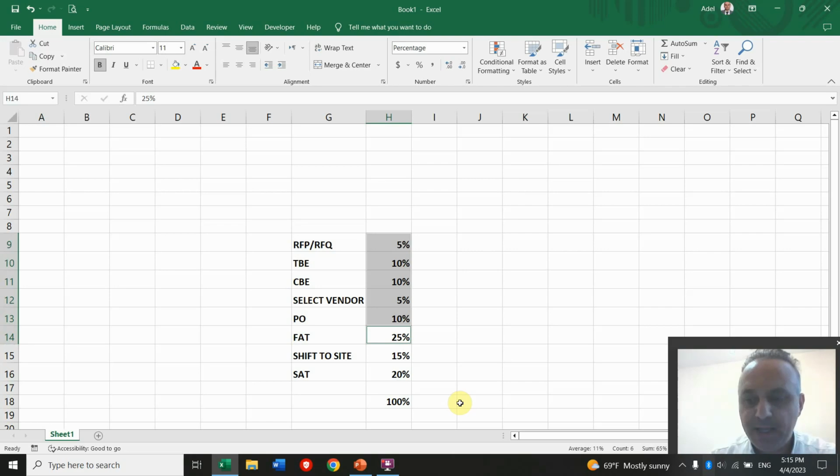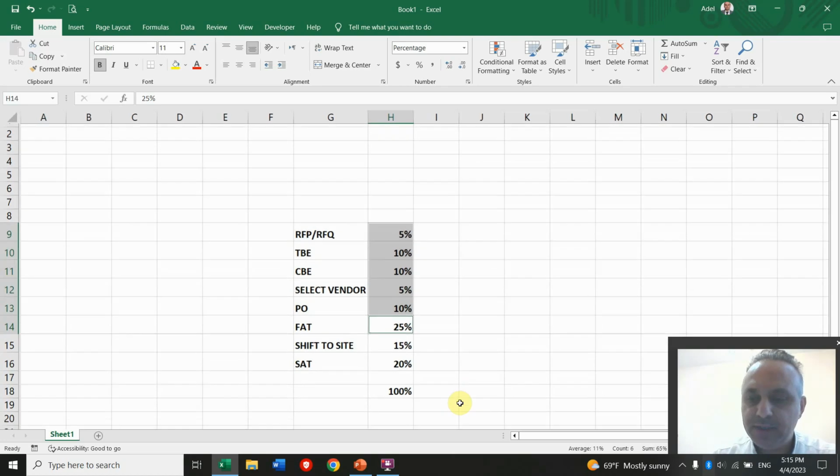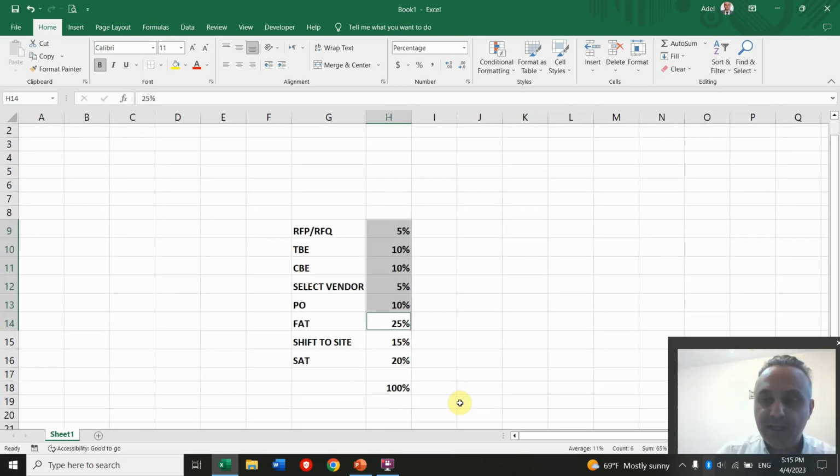Please pay attention. As I said at the beginning, the weighted milestone is generally used for process-based work packages whose steps are standardizable, or you can define them as standardized steps. Generally, we break down the steps to have at least one step or one milestone per period of updating. It means in each period of reporting and updating, we expect to reach at least one of the milestones in our project updating.